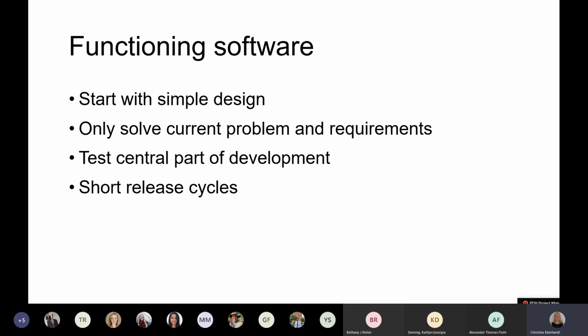So for example, once you finish module A or a certain function of your app, you can go to the customer and be like, hey, this is what we have so far. Is this what you actually wanted to have, or are we completely off track? And for example, if you have other modules that depend on module A, if you change that one to fit the requirements, then you won't have to redevelop everything along the line by just getting the confirmation early on in the process.